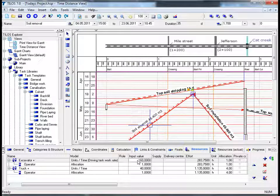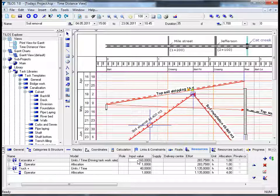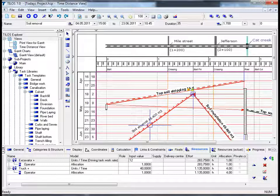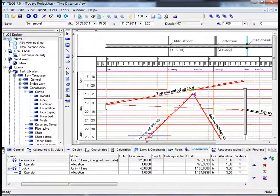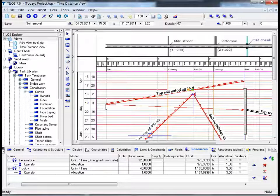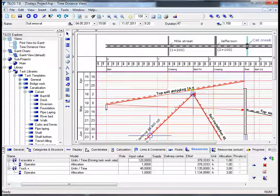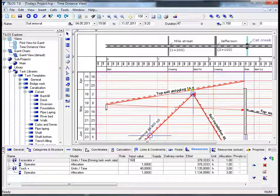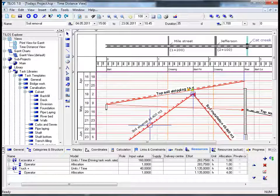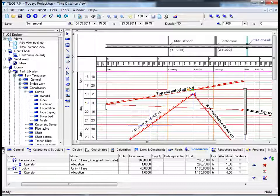Now let's change some of the information to give you a brief insight into how this all combines with one another. If we change the input value to say 120 cubic meters as opposed to 160, we can see after we hit the return button that we only require three trucks now. So beforehand it was four. I'll just change it back to 160 and you can see that due to the increased amount of cubic meters we will then require one truck more, in this case four.